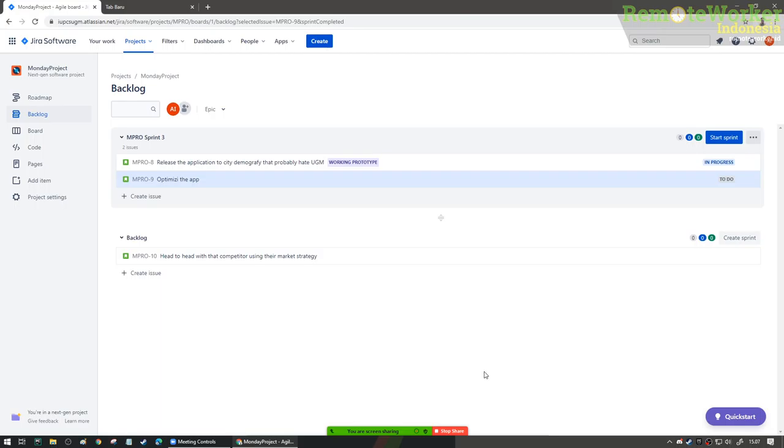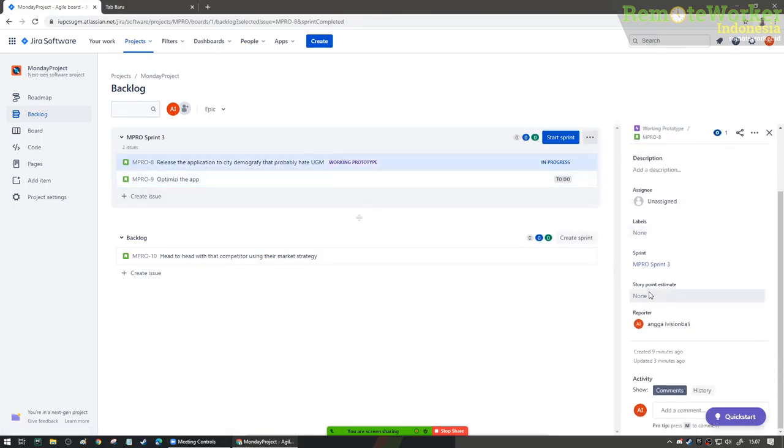Okay, that is a really good question, because I'm going to give you another concept on this: the story point estimate. If I already estimate a task to be, let's say, 16 hours, that means 2 days. So why doesn't it get solved in a week? That's not possible. This means several things. One, I'm underestimating the task. Then you look at the hourly clock that the developer has used, how many hours have been spent on the task. Let's say it's more than 16 hours. Then maybe this task is actually not one task. This is probably a group of tasks that was only thought about as one.